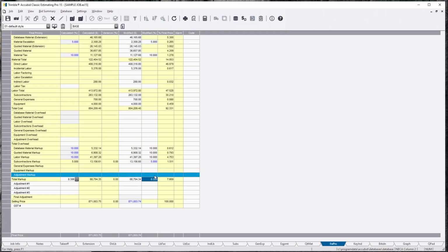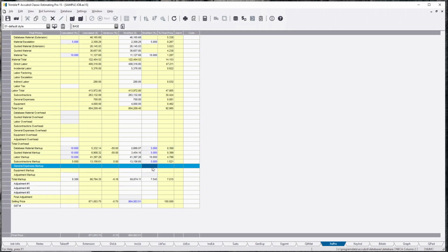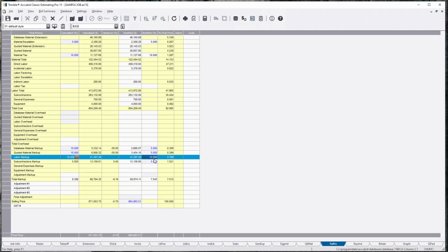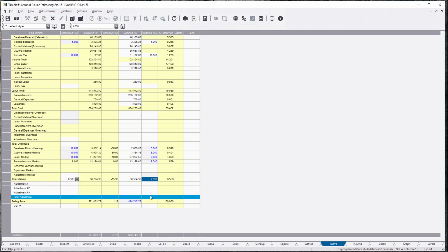If you strategize on how you're going to attack a job, because there's so much markup on different things, even though I'm going to put, for example, 5, and we'll leave that alone, we'll say 9. That's a 7%. A lot of people don't like going under 8. There's a lot of people who don't even like going under 12.